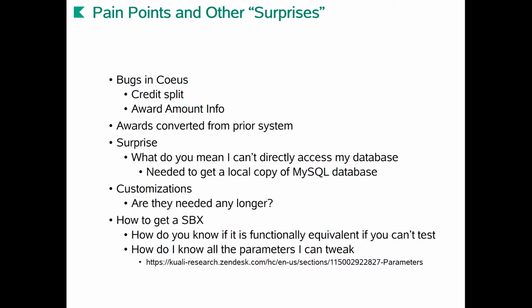So what did that mean? We had to jump into our project plan and say, all right, we now need a local copy of our MySQL database. So Kuali defaults to MySQL. When you go into the cloud, you're going into a MySQL database, not an Oracle database. They handle all that conversion and stuff for you. But in order for us to have nightly access to debug and try to figure out what was going wrong, we needed a local copy of the MySQL database.